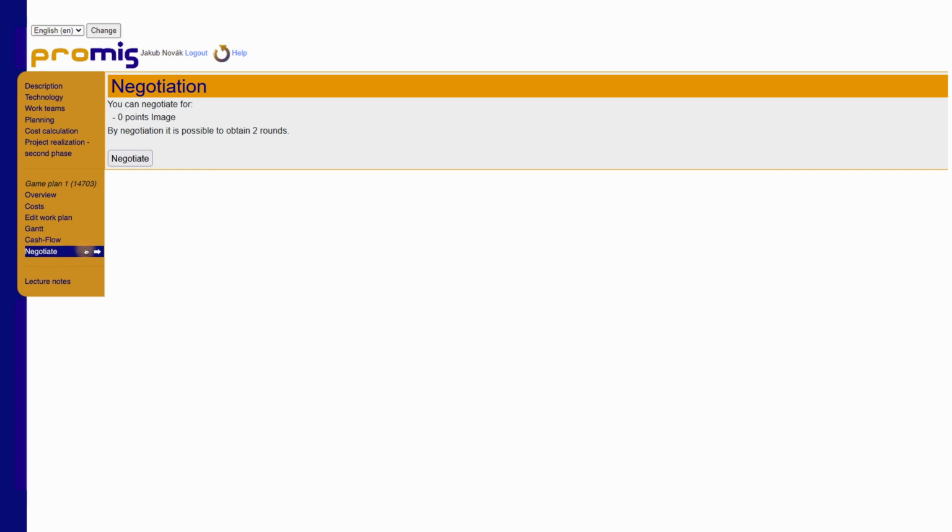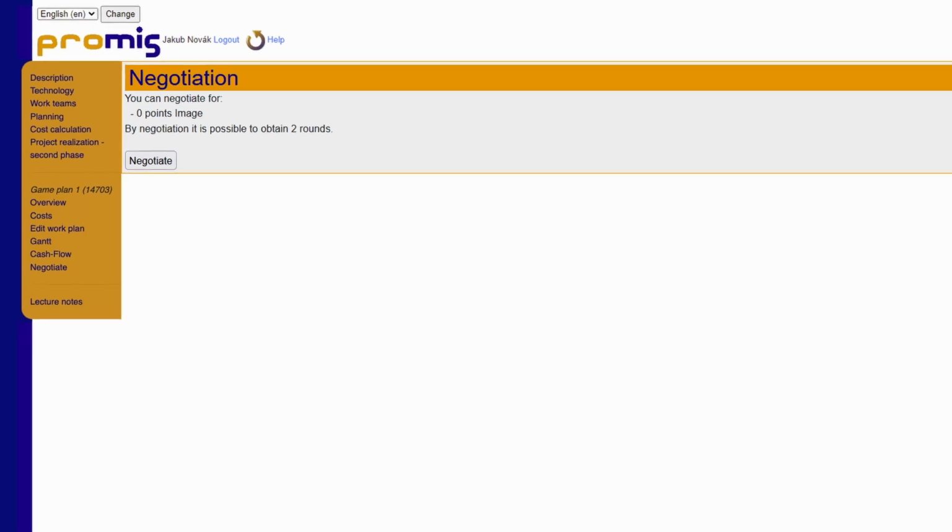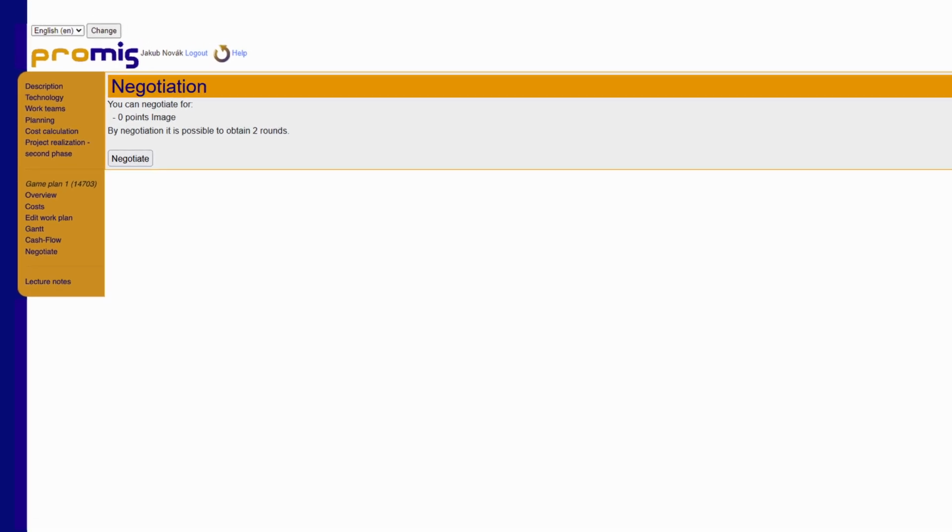Usually, as with EcoHouse, projects are set to count the rounds lost due to external influences. In the case of EcoHouse, you lose the rounds in which the work was blocked due to bad weather. You can negotiate with the investor to extend the end of the project by these lost rounds. You will see what such negotiating may cost you. Sometimes it affects other parameters such as image, and other times, as with EcoHouse, no further sanctions apply.